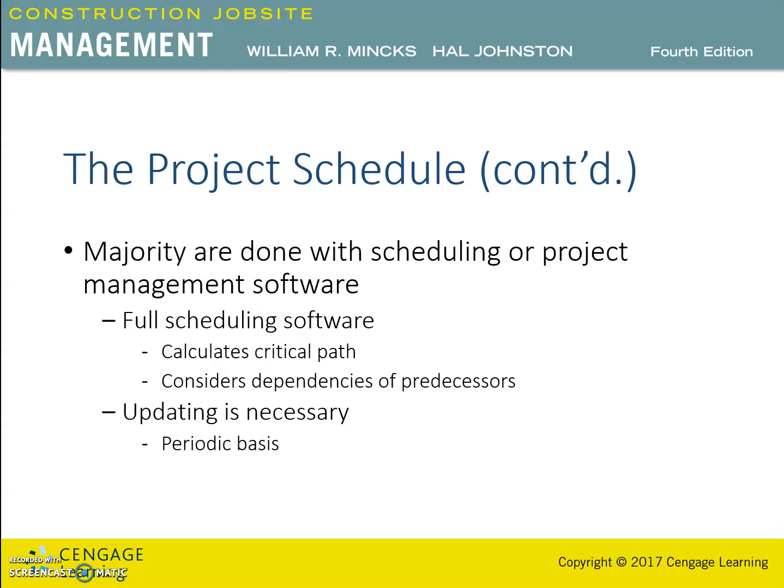So the updating of the schedule is necessary on a periodic basis, either weekly, bi-weekly, or monthly. The primary purpose of this update is to determine which activities are behind schedule and what their effect will be on the completion date of the project.